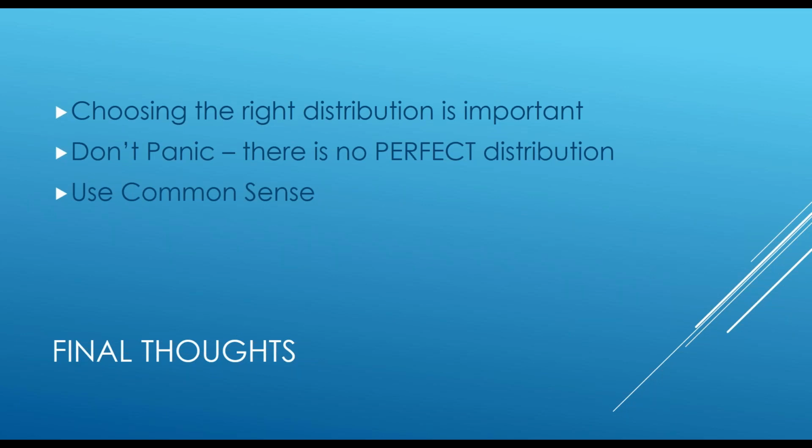When we talked about sensitivity analysis, there was a consultant that used to recommend putting a uniform distribution in for all of your inputs and running a simulation, doing a sensitivity analysis, and then going back through and fine-tuning which distributions you would want to adjust based on which inputs had the most impact on your output. So just use that common sense.